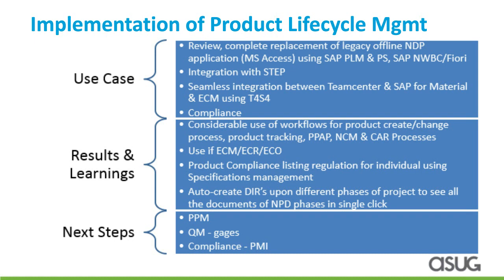One thing we did hit from a lessons learned, and we'll talk about that, was also very similar to Vistex: it wasn't ready from an interface or confirmed, validated version, and was not certified for S4. So we did have to work through some hiccups, but we did get that to work pretty successfully. So again, part of that lesson learned is when you do S4, make sure you check all third-party applications, plugins, etc.